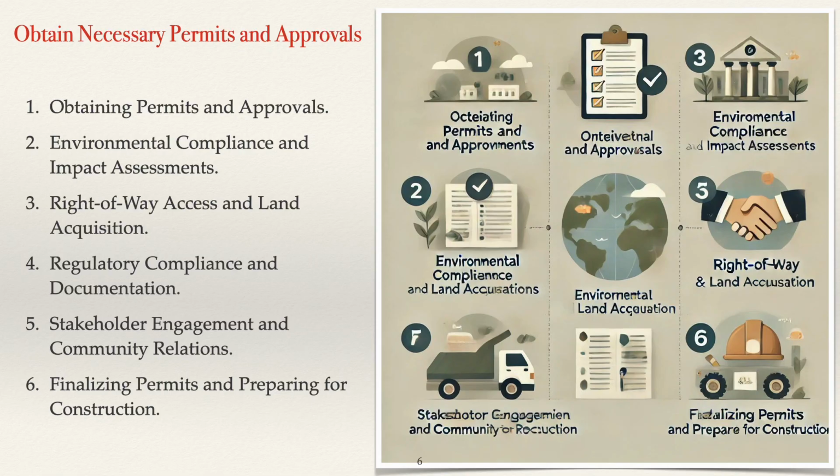These approvals involve submitting permit requests at various governmental levels, either independently or in coordination with the client, to secure land access rights. Additionally, contractors may need to negotiate with stakeholders to obtain right-of-way access. These steps are vital for legally operating on the designated land, protecting the environment, and ensuring safety throughout the project.